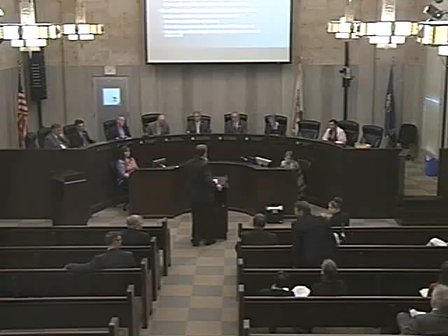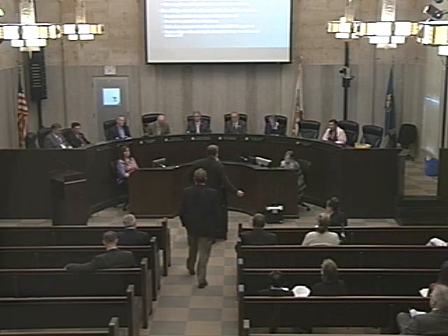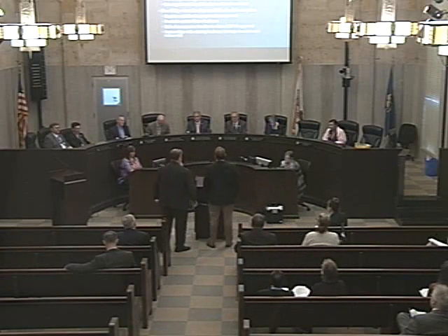So it looks like we need about 76 acres. That's what the rough calculation is right now. And does each credit that costs about $10,000 equate to an acre? That's a very good question. I have Mr. Derek Richard with Intercon here who could probably answer that question a lot better than I could. Okay. I'll try. Yeah, roughly it equates to an acre based on the ratios. So we would need whatever 76 times $10,000 is to cover that. Yeah. Okay. Great. Thank you.